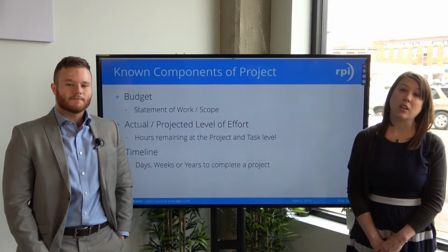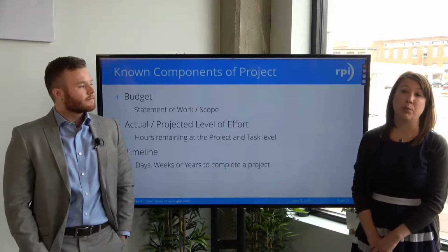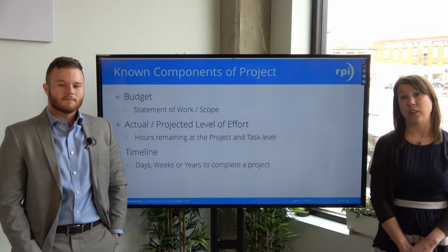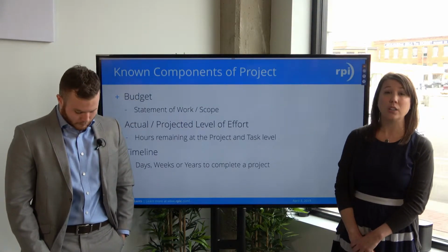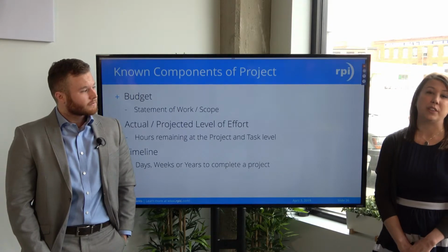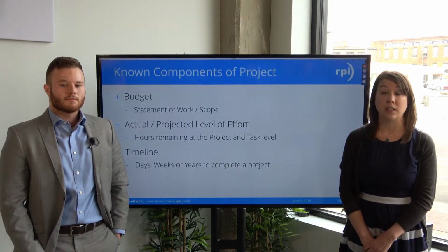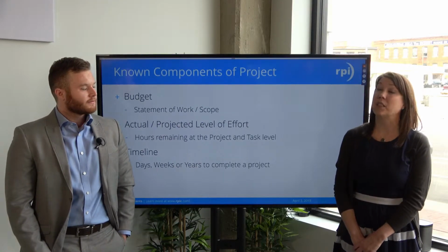Weekly stand-ups are then conducted to provide updates on work completed, work that we still have in progress and remaining. Those hours are then translated into the project plan that you saw earlier to anticipate level of effort remaining. Our timeline can be days, weeks, or years that it will take to complete a project. We adjust the timeline as work is completed more efficiently, or teams encounter blockers that need to extend our timeline.